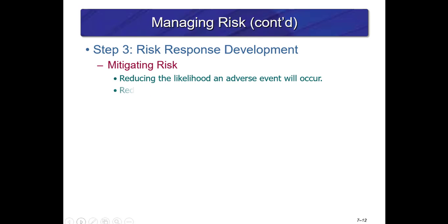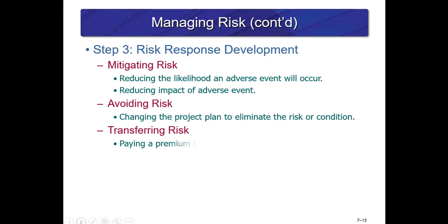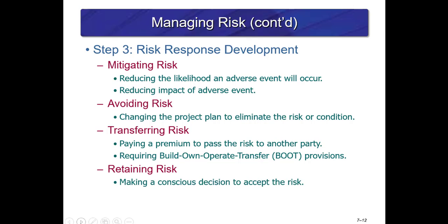The remaining steps, step 3, shows different ways to respond to risk, whether you mitigate it, avoid it, transfer it, or retain it. Again, you can retain a negative risk, but you can also retain a positive risk or a beneficial risk to your project.